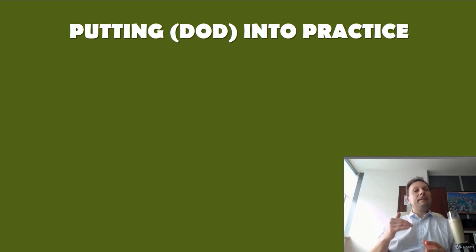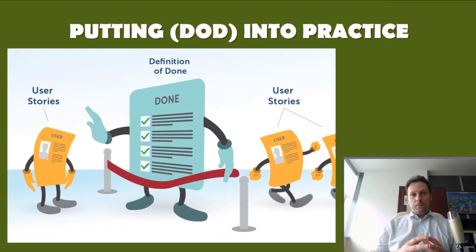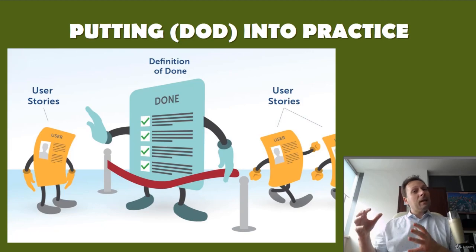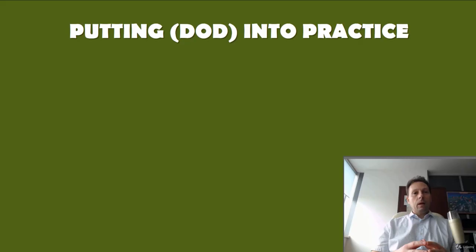Because we must meet the definition of done to ensure quality. It lowers rework by preventing user stories that don't meet the definition from being promoted to higher level environments. It will prevent features that don't meet the definition from being delivered to the customer or user. Once the definition is in place, it applies to everything, ensuring consistency and quality. So that is why you should apply these rules to every single work item that goes through your task board, as long as it involves coding.